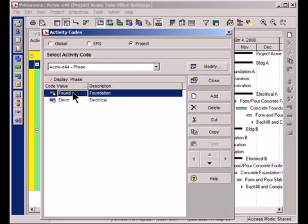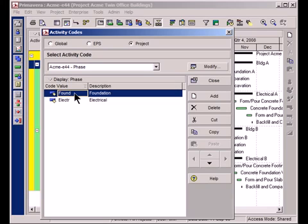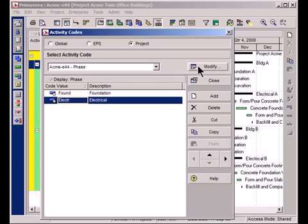I have a foundation phase for each project and an electrical phase. So for all of the foundation activities, I'm going to assign this activity code of foundation and for all the electrical activities in the project, I'll assign it a value of electrical. Next step though is to create another activity code for the buildings. So let's do that.